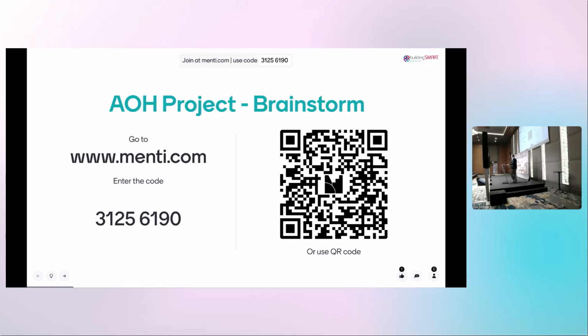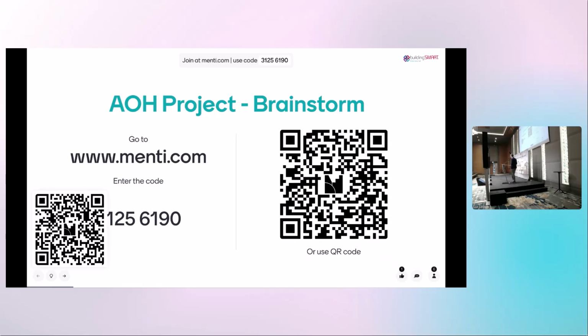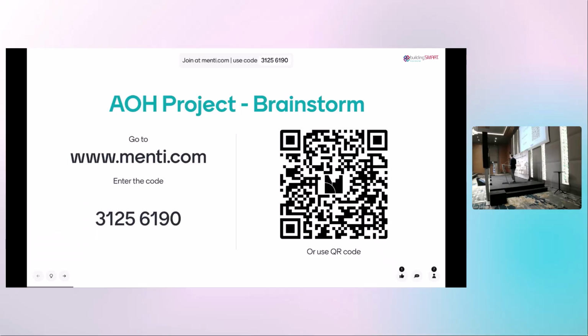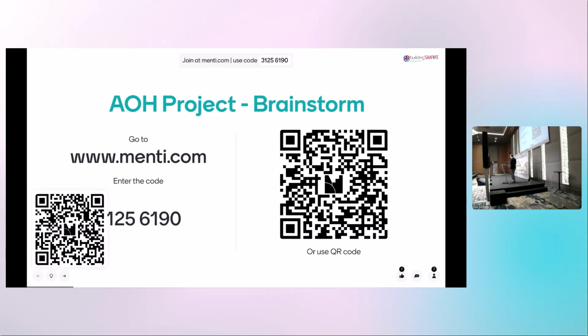So you have to ask the people who do the operation what they need, which information is relevant. And we say during the design and construction phase, this is how we communicate the requirements to the clients, the companies. And that's what we currently plan, or there's a project which looks good, that it should work, that we then can extract the information from the model and put it almost automatically with some transformation into the asset management system.